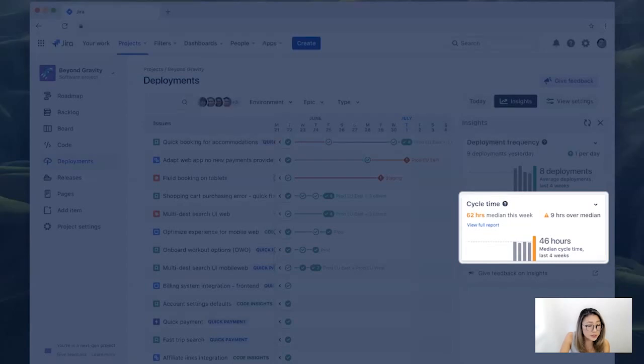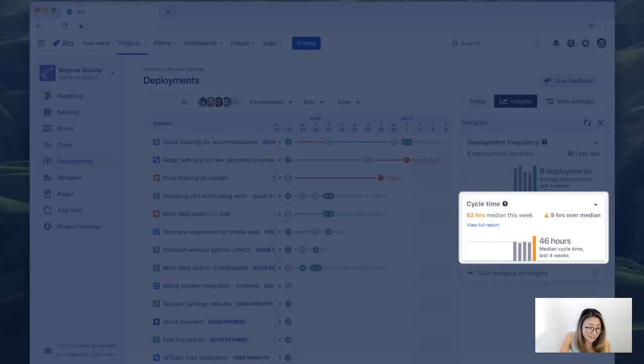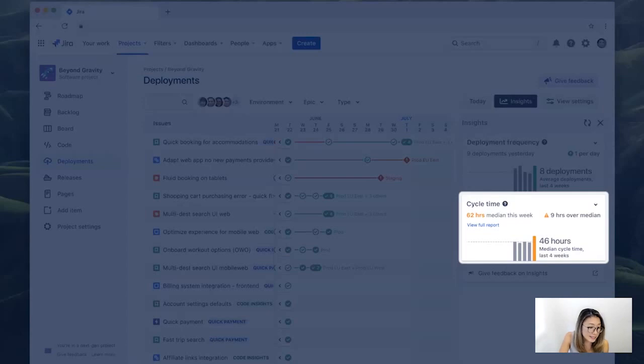So instead, in the deployments view, we measure cycle time from the first commit to a production deployment. And by doing so, we're accurately capturing the time spent in development and deployment. So here we see that cycle time is trending upward and over the median value. And that's not so great. Why is it taking so long? And you want to know what's happening.